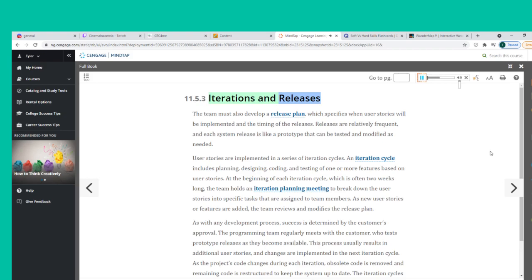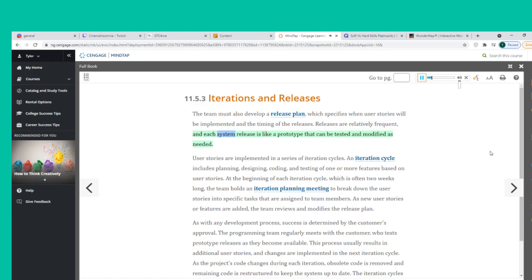The team must also develop a release plan, which specifies when user stories will be implemented and the timing of releases. Releases are relatively frequent, and each system release is like a prototype that can be tested and modified as needed. User stories are implemented in a series of iteration cycles. An iteration cycle includes planning, designing, coding, and testing of one or more features based on user stories.